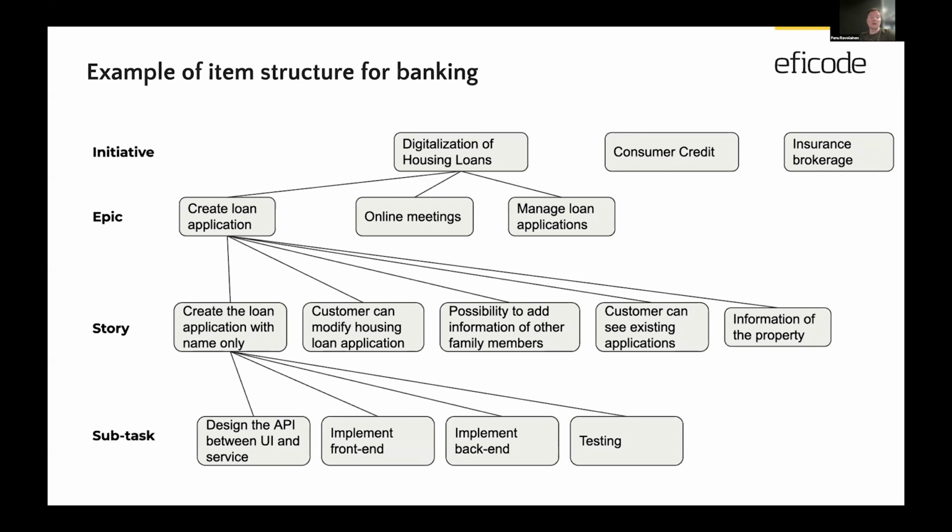Yeah, so about that, the subtasks are not really visible on the backlog. So to keep the backlog clean, we want to make stories which combine the effort from several people. And that way it also helps with communication. We can easily discuss that. What is this story about? What is that story about? And it's easy to understand for people outside of the development team.